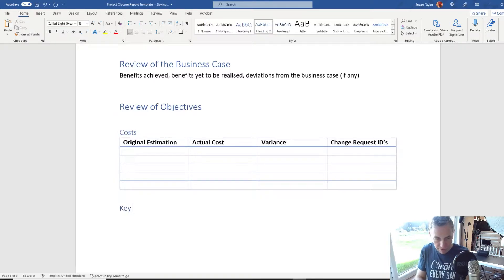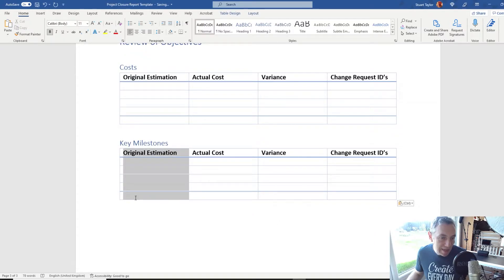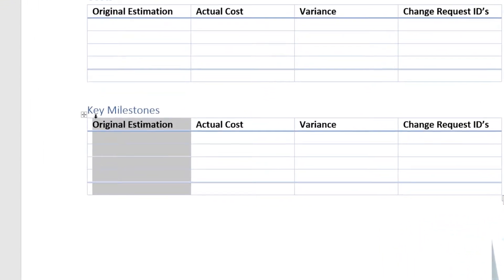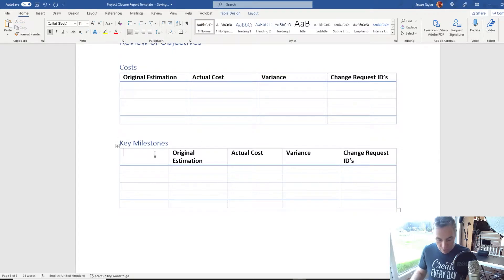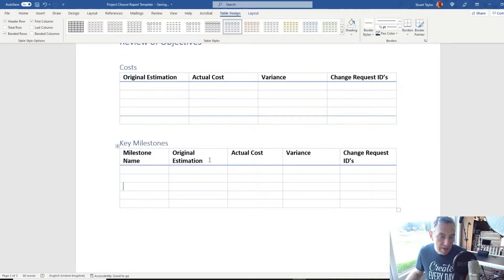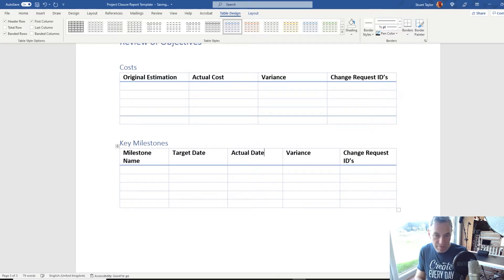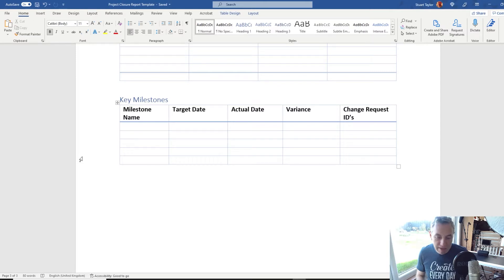Now we're going to add another heading called Key Milestones, and paste in that table we copied earlier. We'll select the first column, right-click and go to Insert Left, and put 'Milestone Name' there. We can select the table and go to Table Design to get rid of the total row. We'll change 'Original Estimation' to 'Target Date', this one to 'Actual Date', 'Variance' (which you can record in days, weeks, or months), and we keep Change Request IDs. When populating this section, make sure to include key events such as end of stages, go-live dates, release dates, and handover dates.